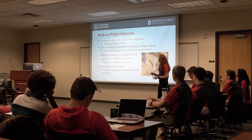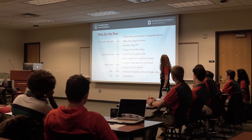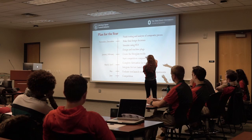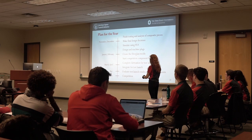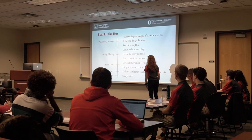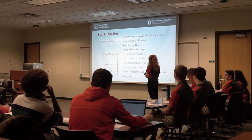So kind of what I was talking about before, putting all of our work towards these next 4 months. So November, December, we'll be trying to finish our designs and finalize using simulation FEA. And then January, February, we'll start building, hopefully wrapping up our build by March and getting ready for our test launch in April. Then after our test launch, around May-ish, we'll make adjustments and wrap up and complete for competition.